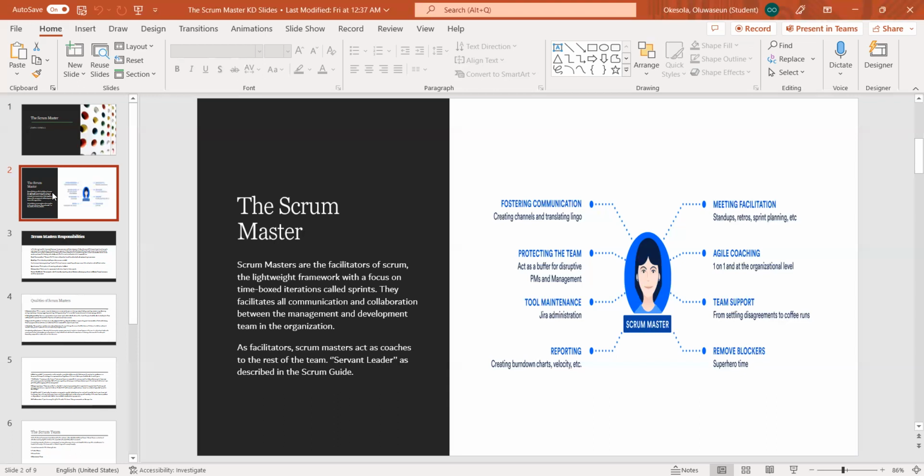And one of the ways to live Scrum is to have the daily stand-up, which is 15 minutes where development team members discuss what they did yesterday, what they were able to achieve, the impediments they encountered, and what they plan to do for that very day.